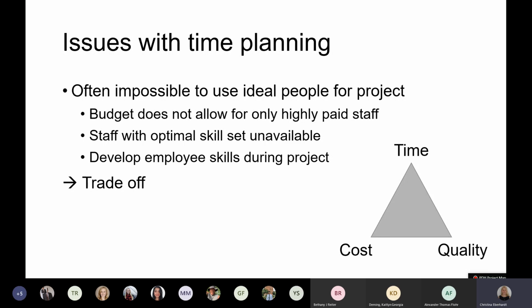They could be set on another project that we are working on, and we can only have them work on 1, maybe 2 projects, but then their productivity will already decline. And sometimes staff might just be on vacation. So especially in respect to the summer months, it is important to keep in mind that employees will be taking time off.